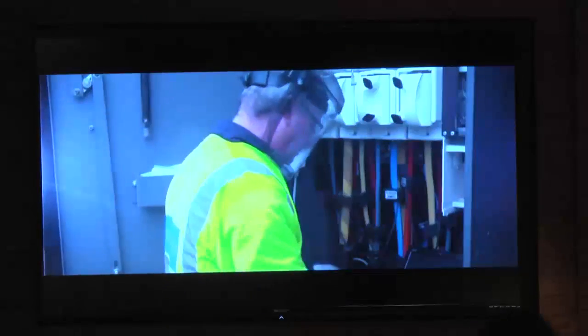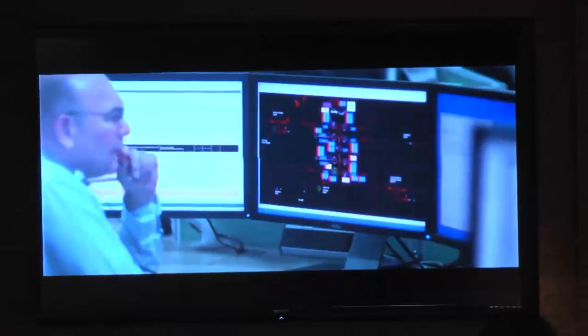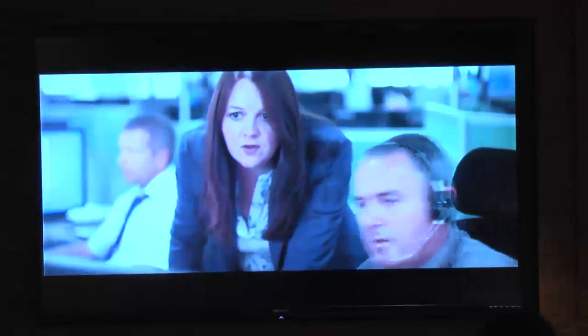We started the journey with a deep understanding of Falcon's functional requirements, smart grid use cases, and derived the communication requirements. We then identified the electrical grid and physical communication infrastructure existing on the trial field. Then our architects designed the end-to-end secured communication infrastructure, fulfilling the requirements of the intervention techniques.